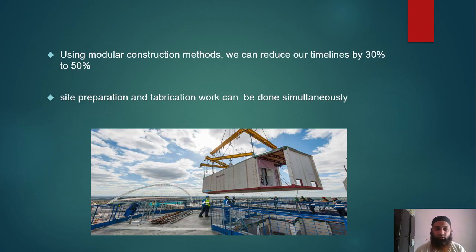You can see here, using modular construction methods, we can reduce our timelines by 30 to 50%. Nowadays, as the construction time increases, there are chances of the cost of construction also increasing. With timelines, you might see sometimes the cost of the aggregates increases, the cost of the steel increases, the cost of the cement increases. If the time is reduced, even the cost might reduce. Because of the time getting reduced, the cost will also get reduced.